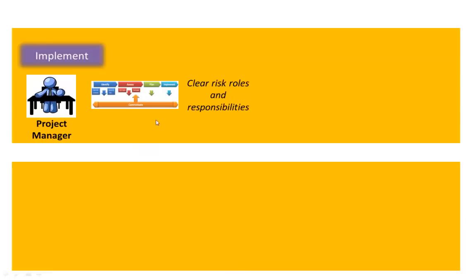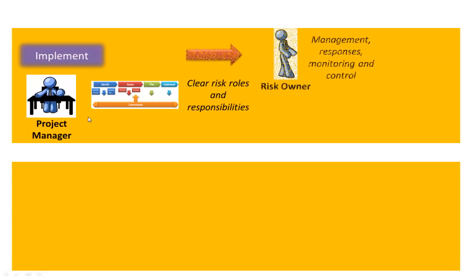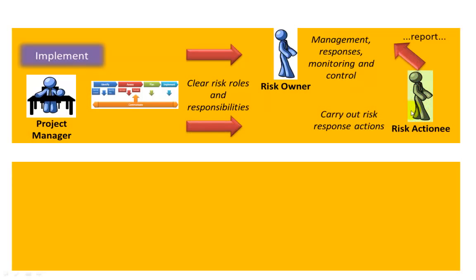The next step is implement, and this is where you need clear risk roles and responsibilities. In effect you are building your risk responses into the various plans and, as project manager, making sure they are happening and that risks are being appropriately managed. The risk owner — which may be the project manager or even members of the project board — is responsible for managing the responses, monitoring their effectiveness and controlling by taking action to ensure responses have the appropriate effect. The risk owner may delegate actions to a role called the risk actionee, who carries out the appropriate response actions and reports back to the risk owner.